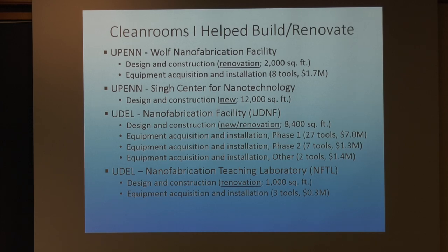Penn already started hiring what I would call heavy hitters, rock stars in science and engineering, and they needed to give them a playground. The side effect of the Wolfman Fabrication Facility was people like me and other staff who were involved in renovating the cleanroom, we learned a lot. So by the time we actually went and built the Singh Center for Nanotechnology, there were very few screw-ups. Now there were some screw-ups for renovation of the old cleanroom, but we learned our lessons. And you see from the timeline, it took 2 years from the time the ground was broken until the cleanroom was actually certified. It just went very fast.